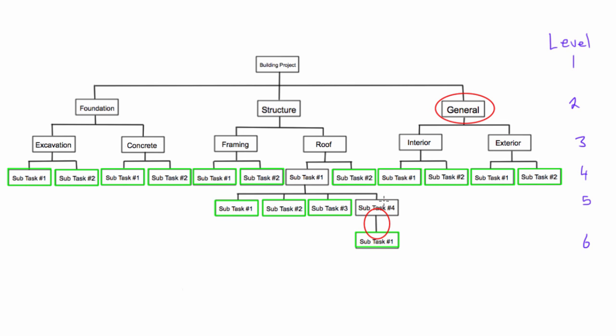Sometimes this will happen with an industry standard, if you're following a certain format, but if not, always try and avoid that, because then what distinguishes this work package. This is just a subtask category that leads into a work package, that can probably get eliminated and just make this the whole work package right here.